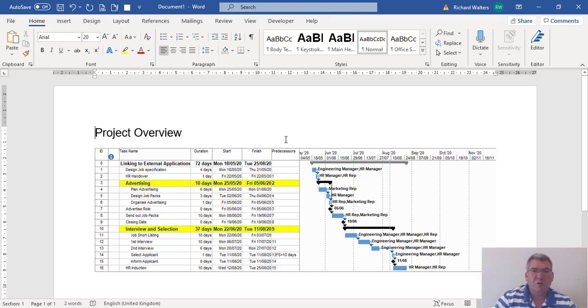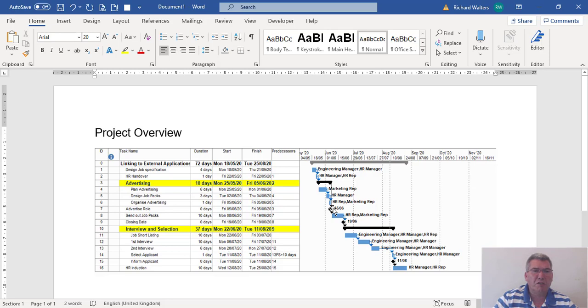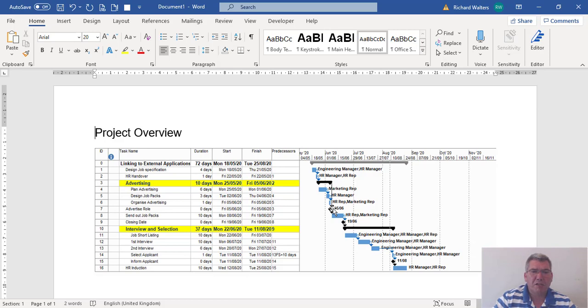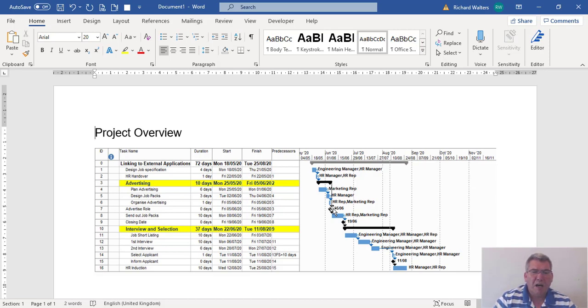Nice and clever. Project could be linked to multiple applications. This is an example of Word, but it could have been linked to PowerPoint or Excel. Any Microsoft application can be linked with Microsoft Project using this method by copying a picture, saving it somewhere, then bringing it into the external application as a link. Then updating Project, and the copy picture is saved with the same name. You're updating the external application as we have here in Microsoft Word.